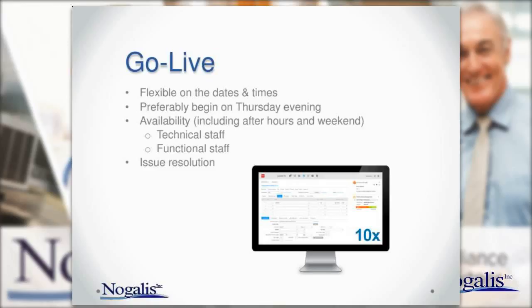Yes, so what we did for this customer was we added the ACA patches to their version 10 environment up to the patch level that they had in version 9. And then we just dumped the data out of the source database from our data set that we were using, and then imported it into the version 10. And then from there, the records matched exactly. Good.